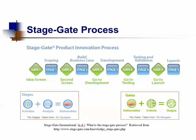Let's begin with the Stage-Gate process. The Stage-Gate process is a sequential system separated by stages wherein there are activities and analysis that equate to certain deliverables or outputs. Each stage has different deliverables based on different criteria to produce the output. The different stages are scoping, building a business case, development, testing and validation, and the end result of launching the innovation.